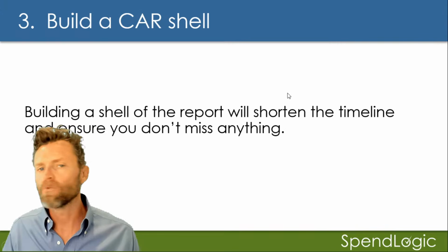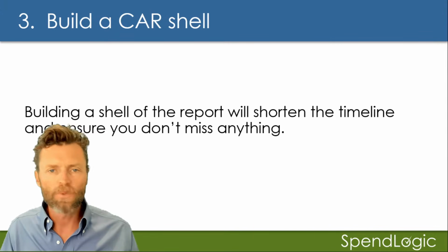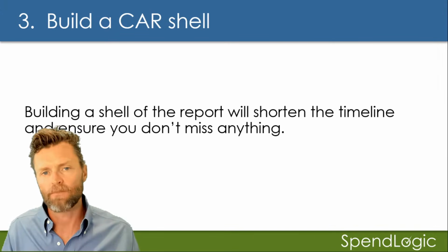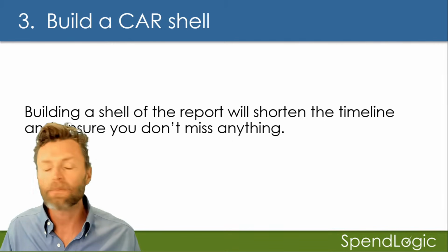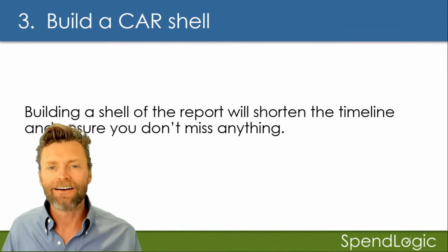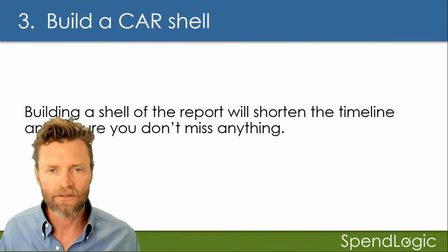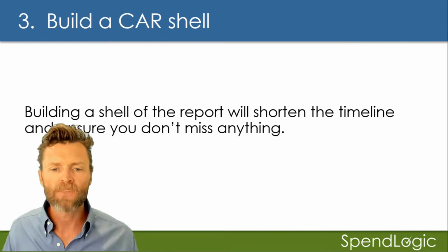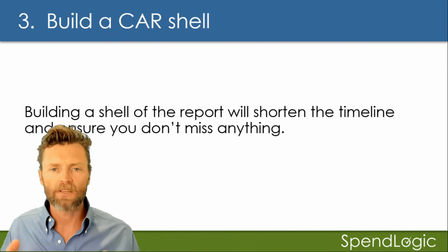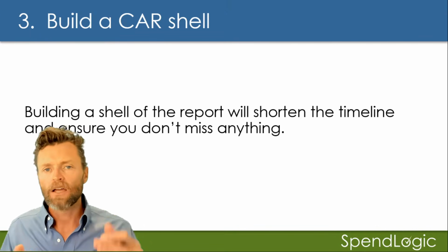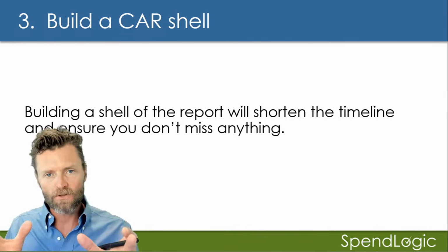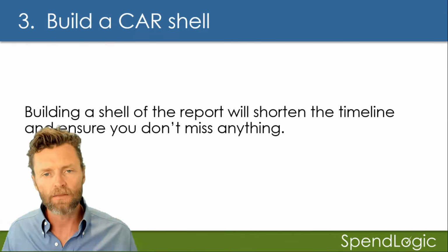The next thing that I do, once I become basically familiar, is create a couple of templates. The first is the shell of the CAR. As I say CAR, it's cost analysis report. I'm probably going to say that a lot. That's a term that we use very commonly within the company here. So what this is going to do, if you can create this shell, is shorten the timeline. As you look at the proposal, you understand all of the cost elements.